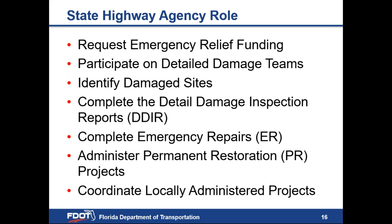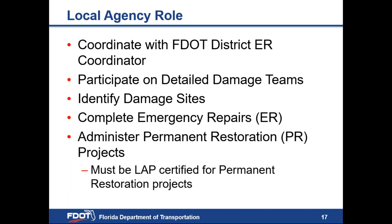It is important that you as a local agency provide damage information to the district as quickly as possible following an emergency event so it can be incorporated into the summary. Following an emergency event, FDOT is responsible for requesting ER funding, participating on detailed damage teams, completing the DDIR, completing emergency repairs on state highway facilities, administering permanent repair projects, and coordinating locally administered projects. Each local agency is responsible for coordinating with FDOT, participating on detailed damage teams, identifying damage sites, completing emergency repairs, and administering permanent repair projects. A local agency must be LAP certified to administer a permanent repair project.